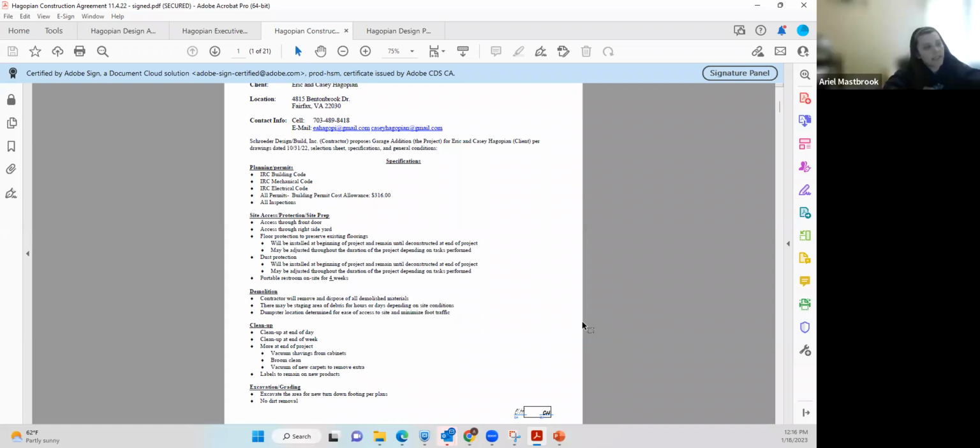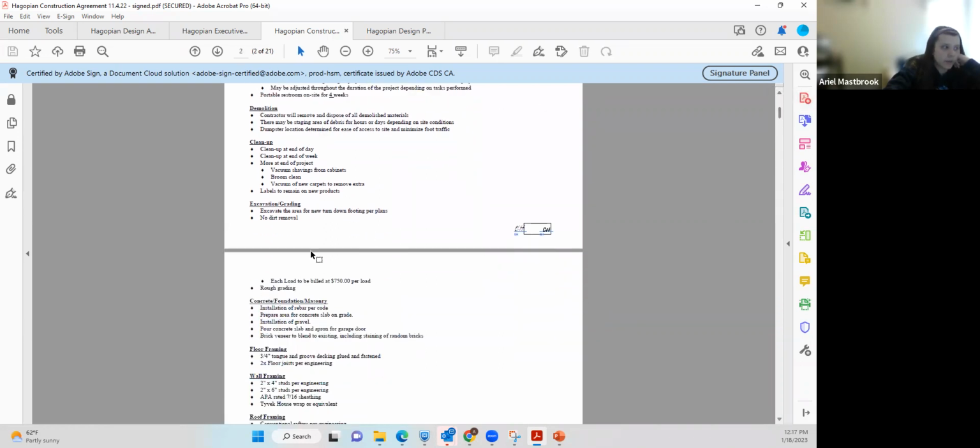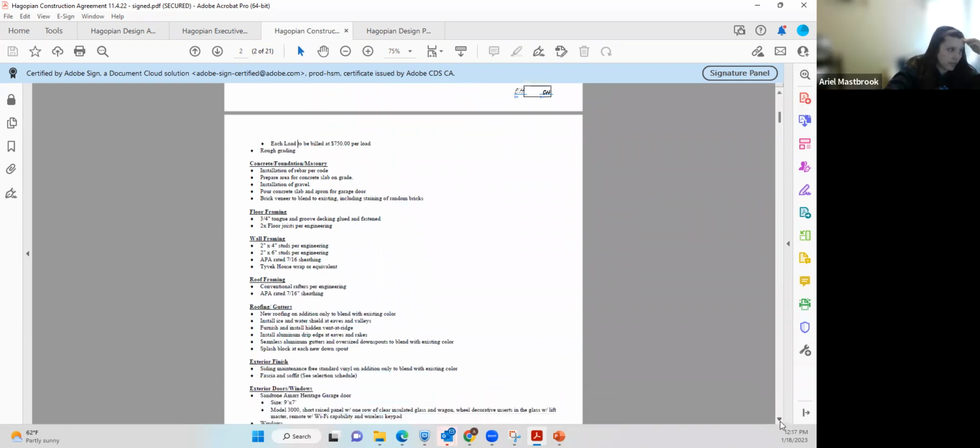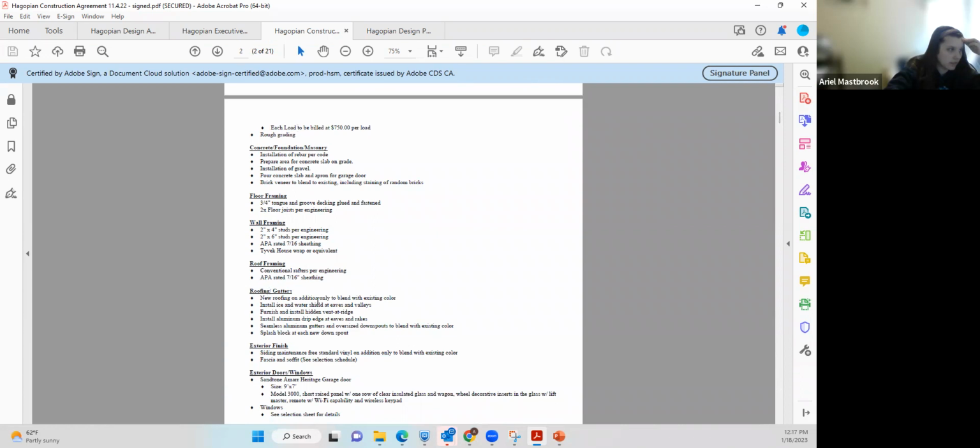Presently the way it works is there's a template and the project developer would delete the things that don't apply, and we would update this. We would grab things from trade quotes. So let me find the example. Like this is straight out of a trade quote. The trade that we put in the estimate, I just copied this right out of their trade quote.